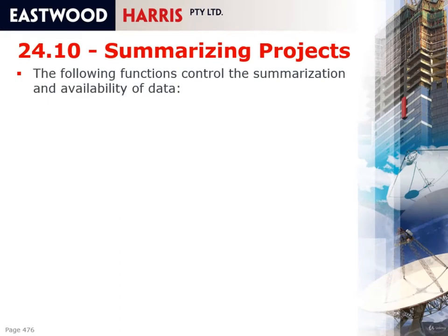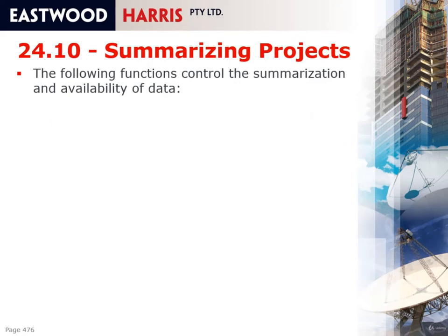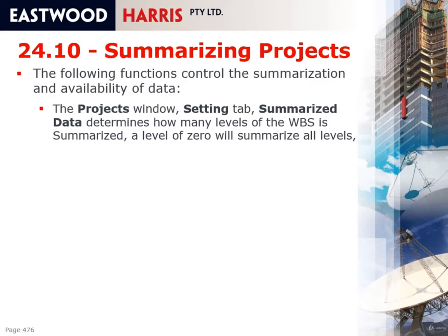Summarizing projects, the following functions control the summarization and availability of data. First of all, the project window setting tab, Summarize Data, determines how many levels of the WBS are summarized. A level 0 will summarize all levels.